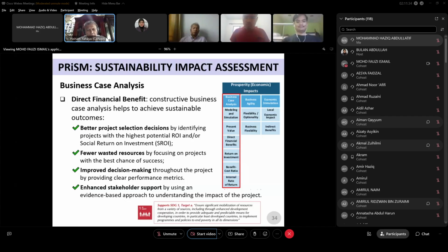Are you looking into minimizing the waste? When you optimize a project of 6 months, you may have a lot of lifting, and this lifting, when you combine it, can be 2 months. So instead of engaging a crane for 6 months throughout the project period, you only engage the crane for 2 months, by optimizing all the required lifting within 2 months, out of the 6-month project. So this is something which, as an engineer, you can plan. You can look at how to minimize the use of machinery for a particular project, and how you can then add value to the return of the company. Okay, so these are some of it.